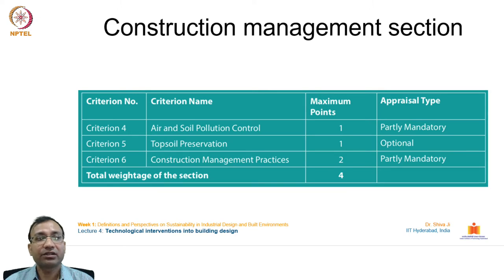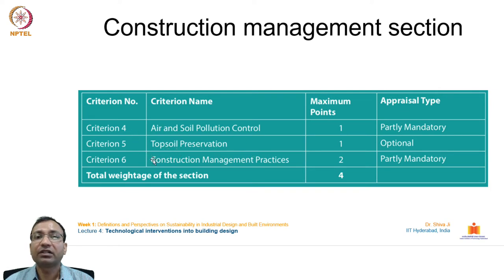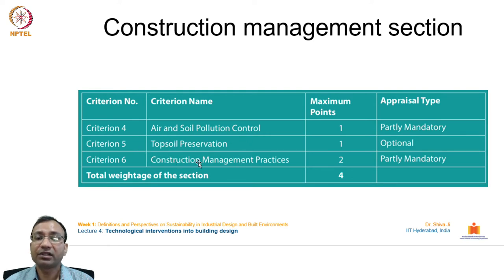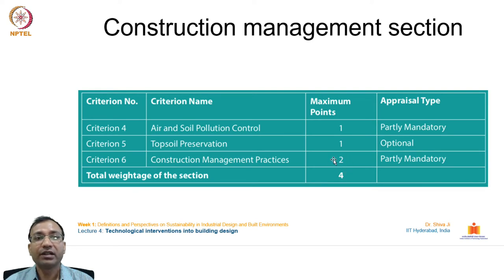The construction management section addresses pollution control — air, soil, and water pollution must be controlled, receiving 1 point. Topsoil preservation is also critical as construction activities degrade topsoil through debris, cement, oil, and grease, damaging the microbes and organisms it supports. The third criterion is responsible construction management practices for workers' welfare, receiving 2 points — totalling 4 points for the section.